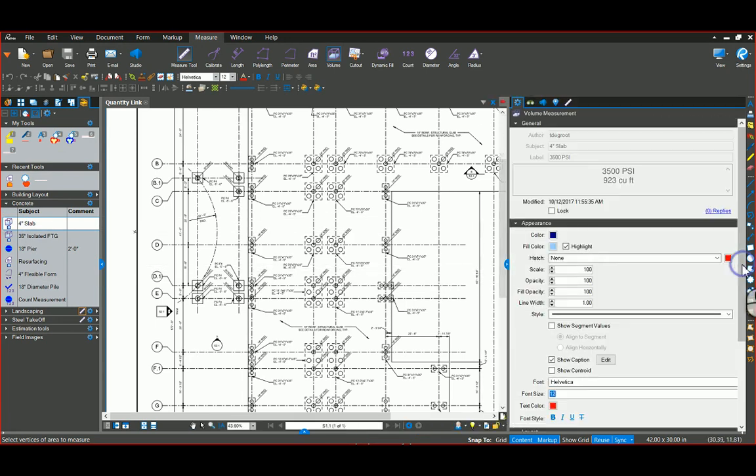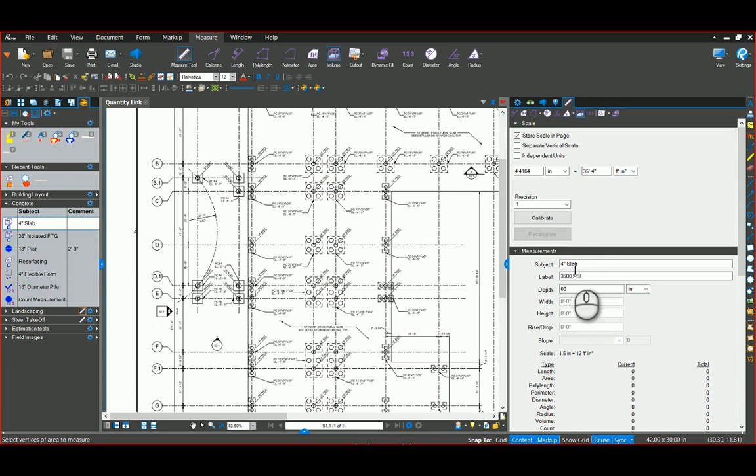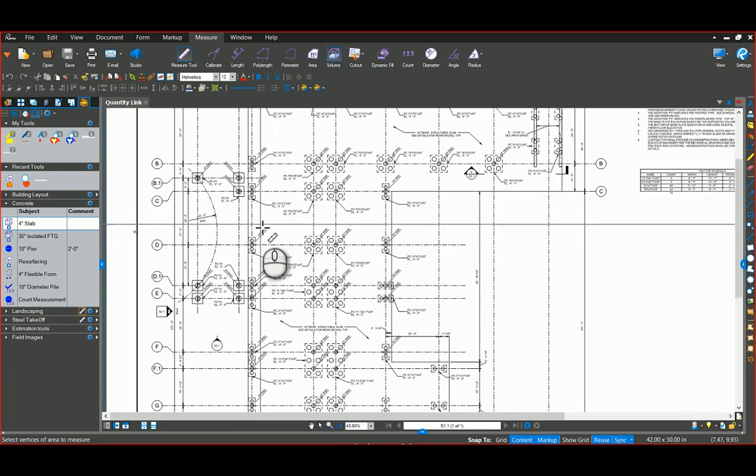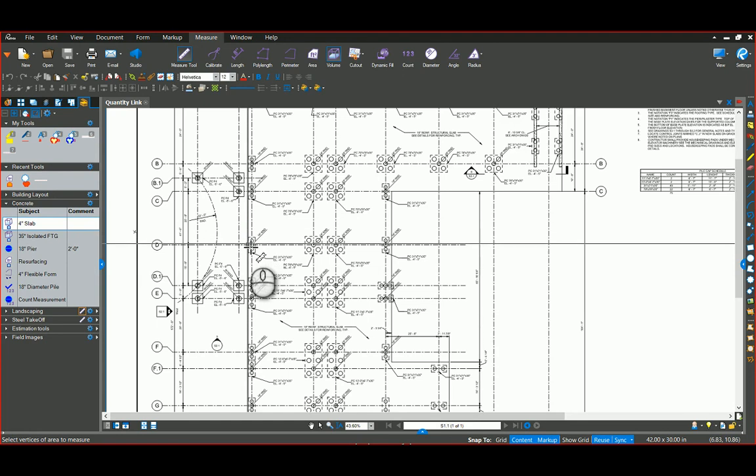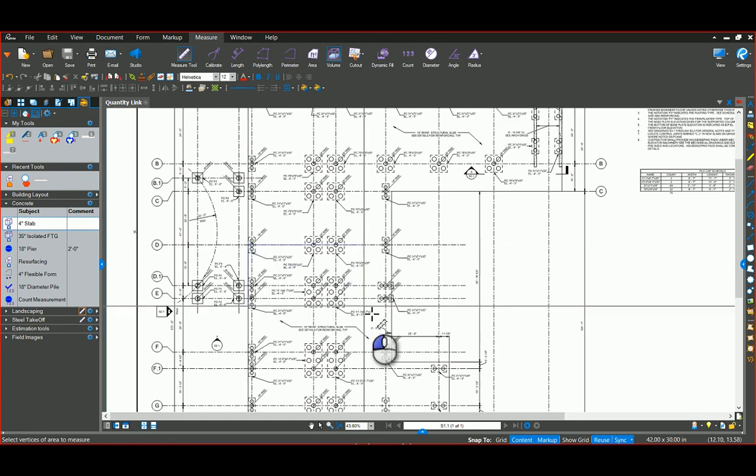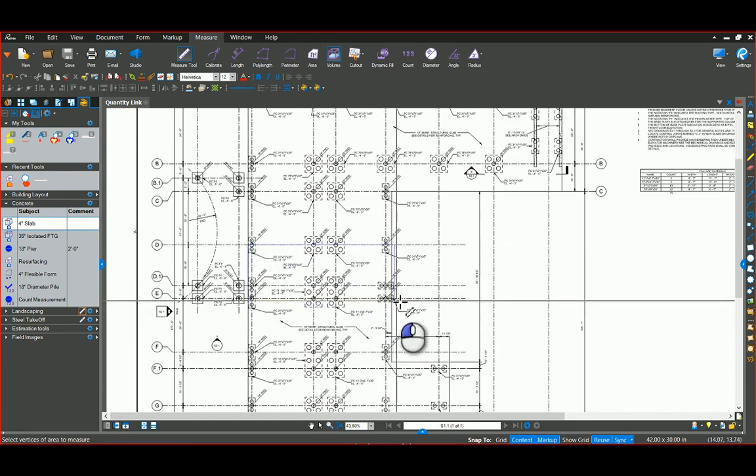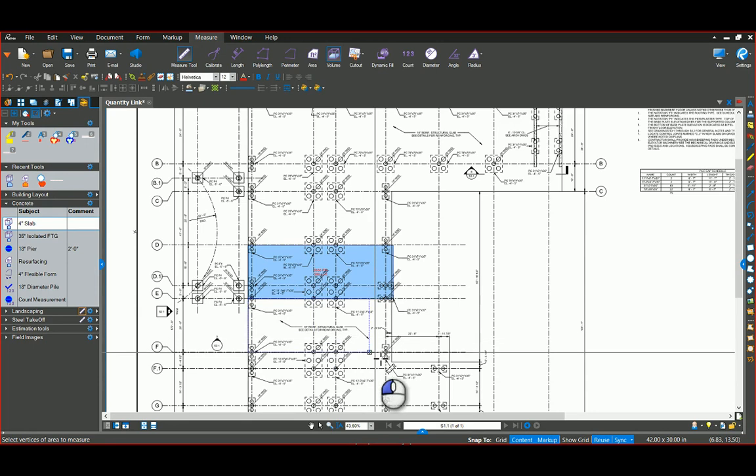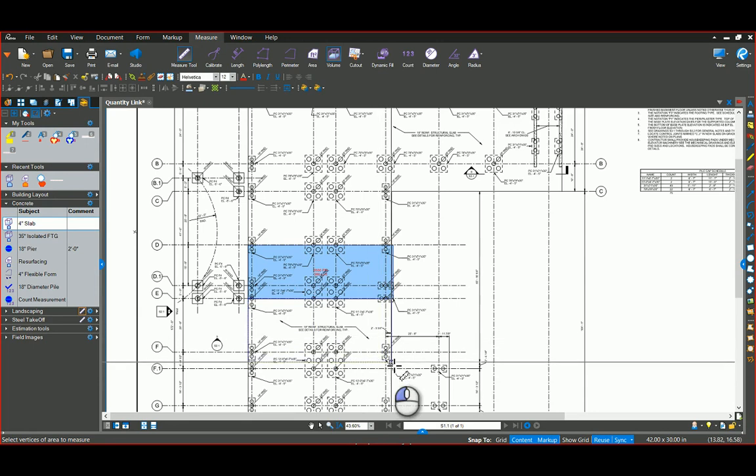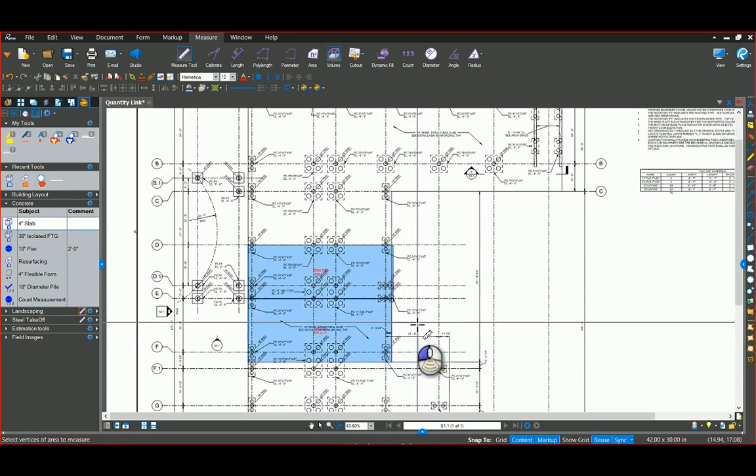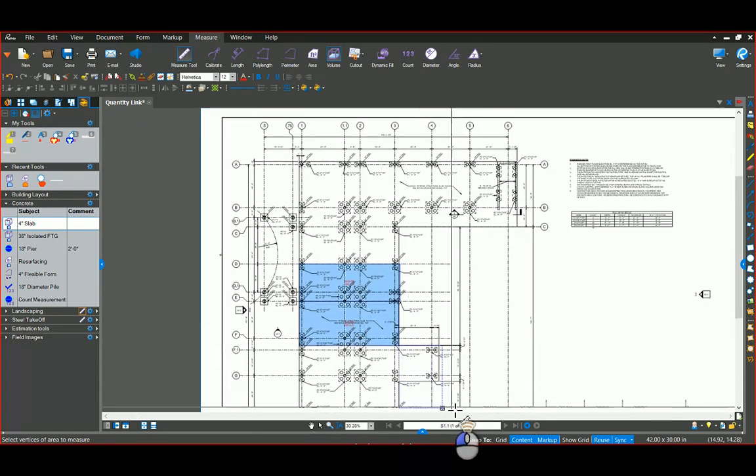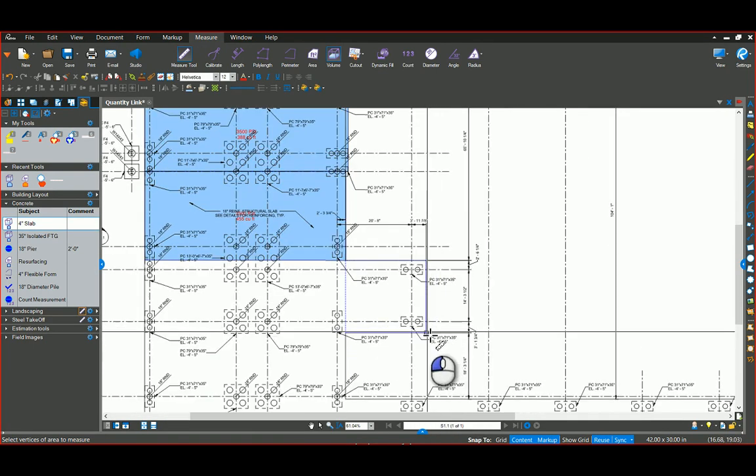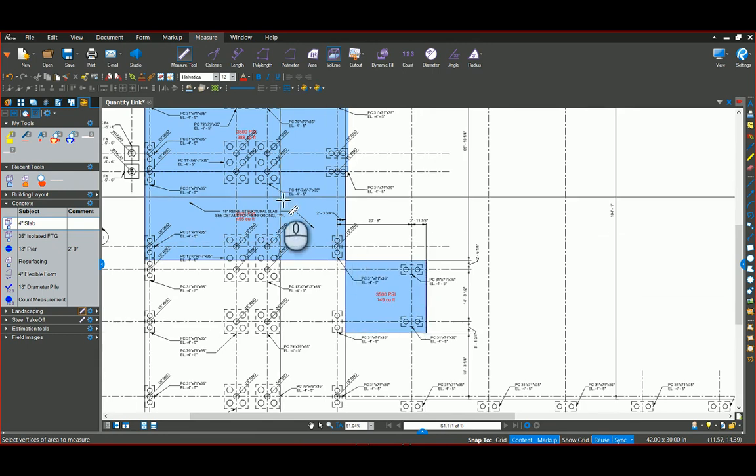I always go over to my properties or my measurement tab here and make sure that I set that as a four inch depth. Then I can come in here and trace where my different pours are going to happen. So I cover that area, that area, and I'll just do that one here.